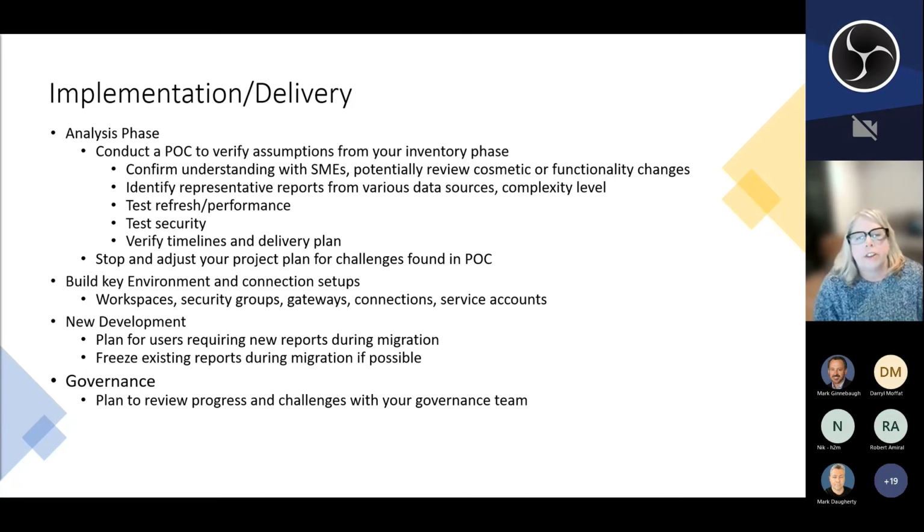So in terms of delivery, capturing that inventory, prioritizing, setting up the project plan, it's all great. It's going to work, but you want to stop and do something else, which is really a little more of a deep dive and some analysis. And I recommend a proof of concept, and build out a proof of concept that's going to verify some of those assumptions we made, right?